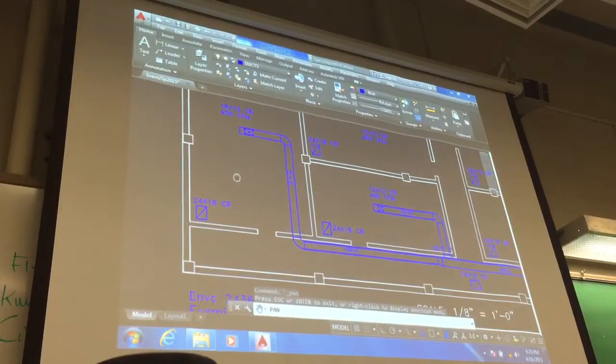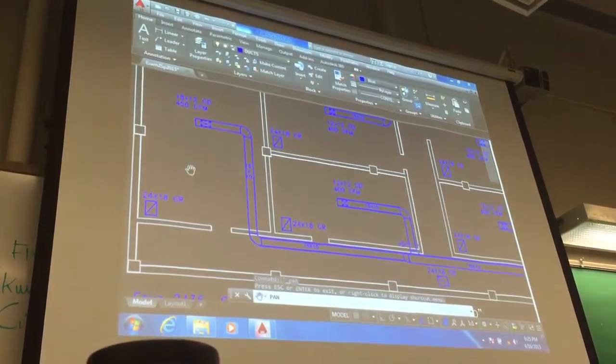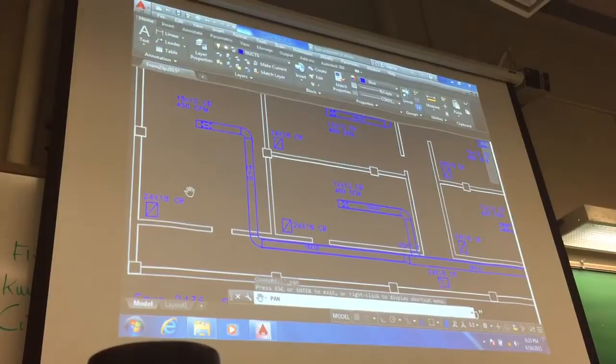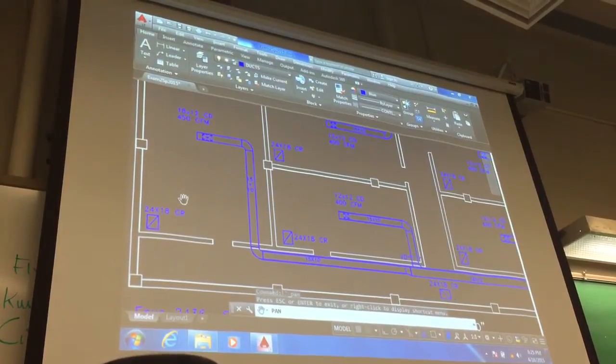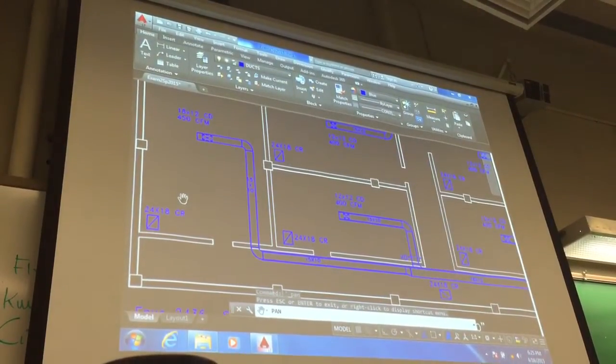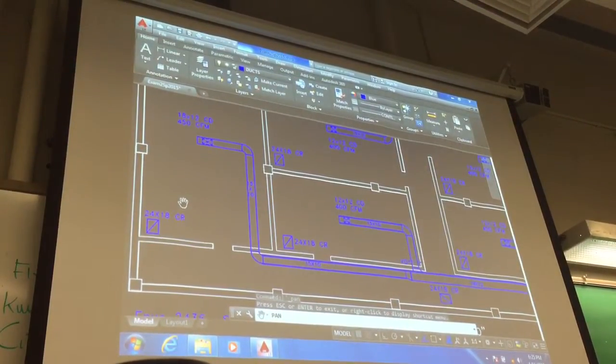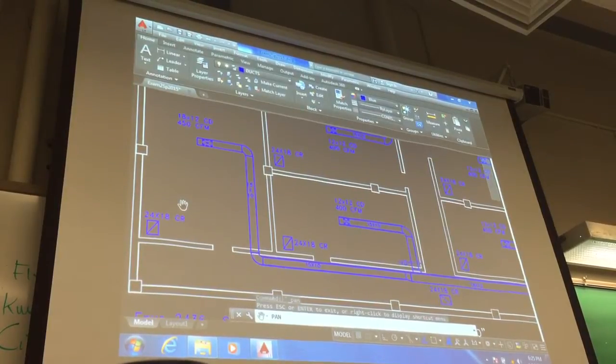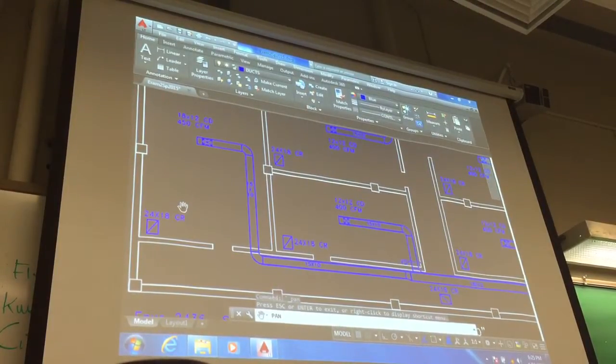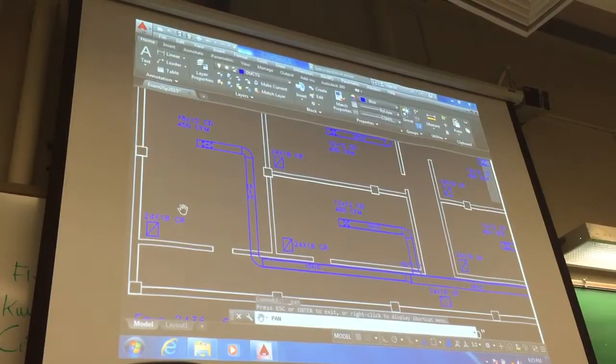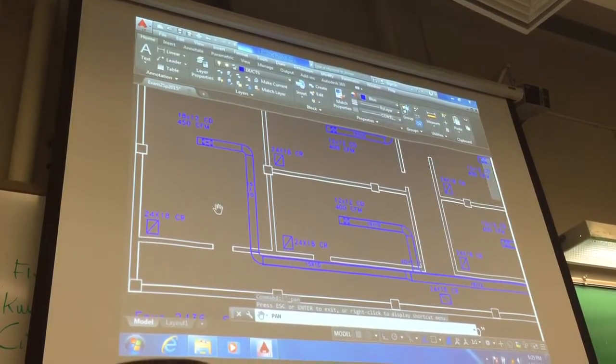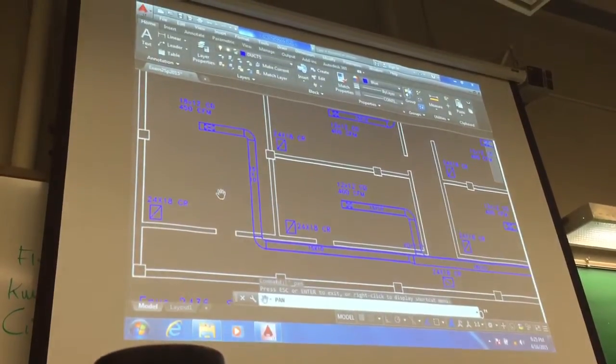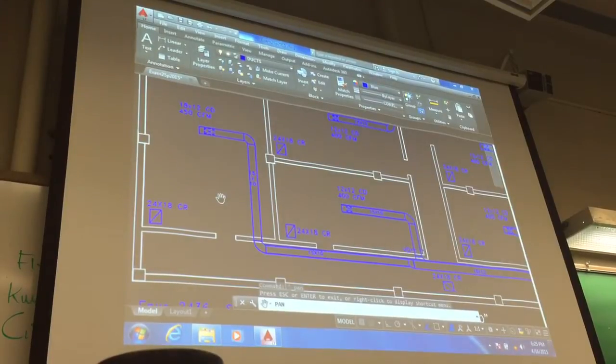In terms of the duct, you'll get the lengths of the various pieces of the duct and you'll get the duct schedule and you'll need to calculate the overall duct weight. I'll give you the length, you don't have to measure the length or anything like that, or any of the fittings, you'll have all that.